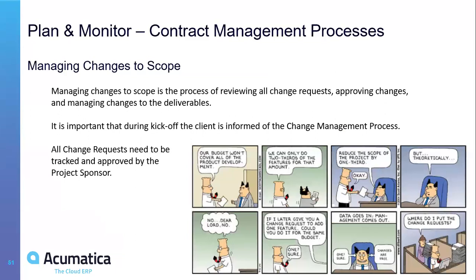So how you manage changes. Everything that changes should have change requests. This is not only money. So if they ask you to do more work, yes, it's a change request. You need to identify the scope. You need to estimate the man days. You need to get paid for it.